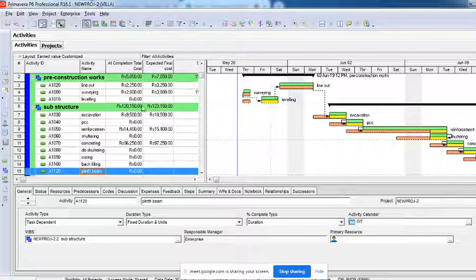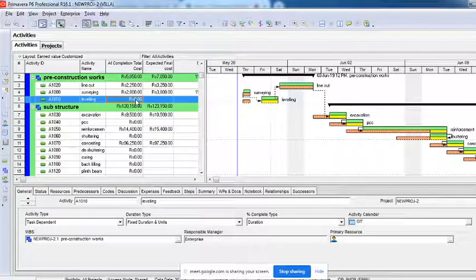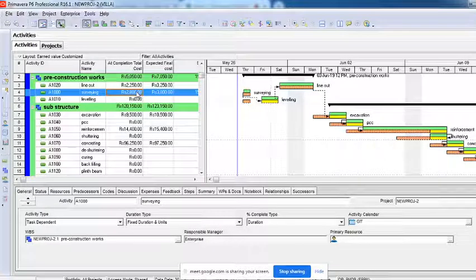Right? So what will happen if I change a number here? Now this is 2800, it was the at completion cost, right? But if I increase the resources and the at completion cost increases, 2800 becomes 3800, and automatically there will be a change here also in the expected final cost. So any change you make here will also affect it because it is formulated. That's very simple, just like what we do in Excel.